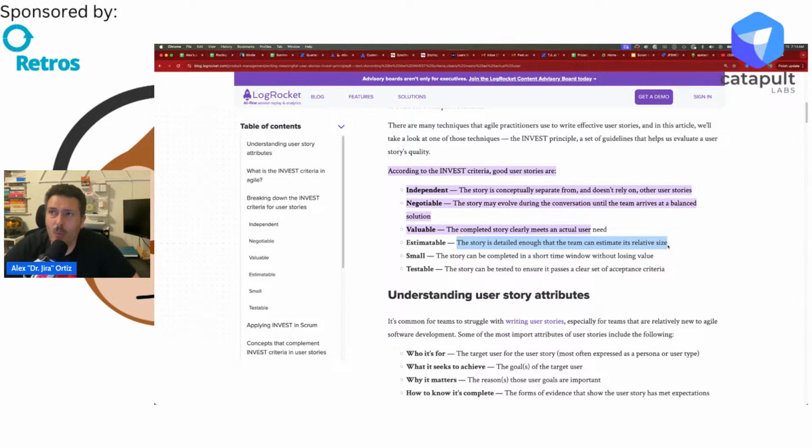I think when stories are too big, right, when they're just so massive, our teams hide and they just give you either really, really big, far-fetched numbers like a 21 on your story points, right? If you're doing the Fibonacci, the 1, 2, 3, 5, 8, 13, 21, right? They're going to give you the highest, 21 points there. But that's mainly because they don't understand, right? You didn't do the independent, you didn't do the valuable. We're not doing the small. That's coming up next, right?